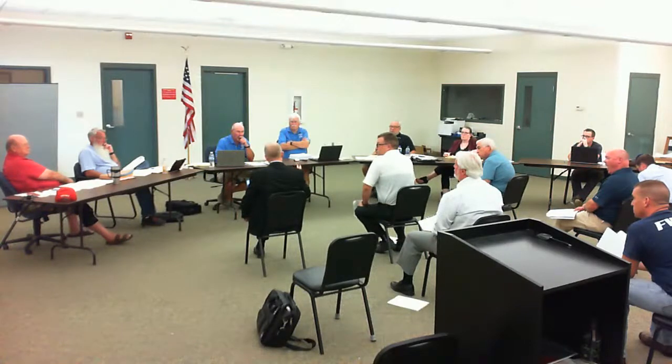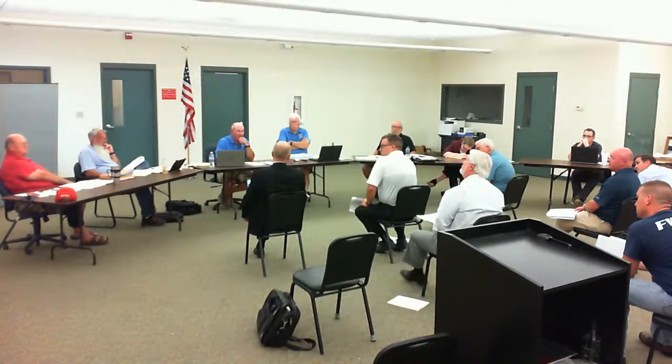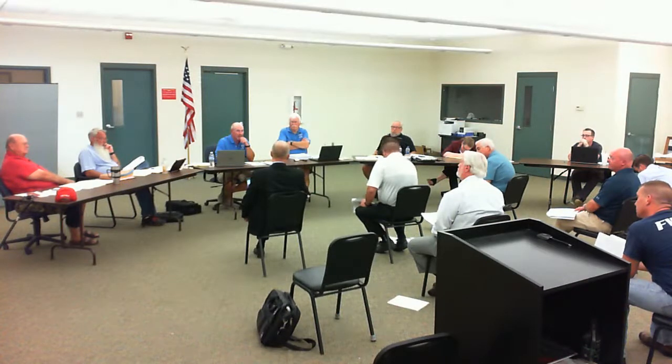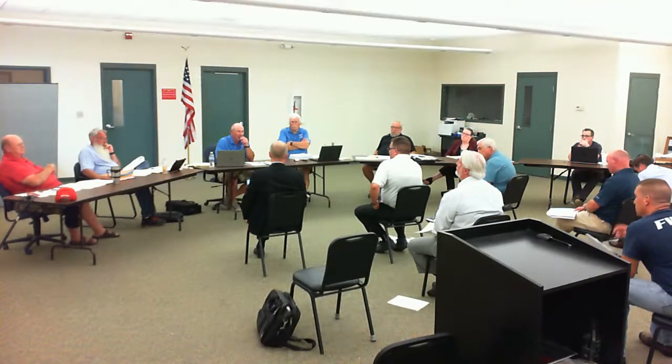What I was gonna say, and maybe alluded to, is that on an annual basis you maybe need to look at this pretty closely, at least for the next couple of years, particularly to your point where there's a big decline. As part of your 2021 budget planning, look at the financials and the revenues and the planned expenditures according to the capital plan and your operating budget, and specifically the collections over at least the last several months and trending, to see if that's going to hold up when you're doing your 2021 planning.